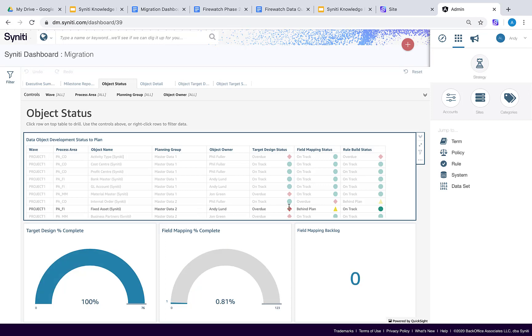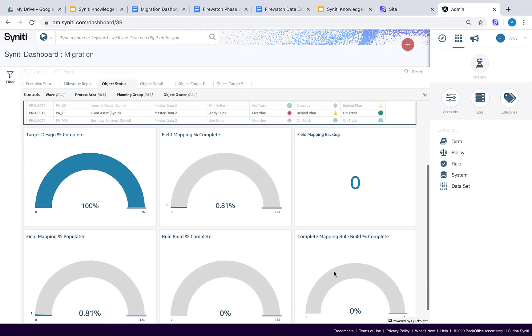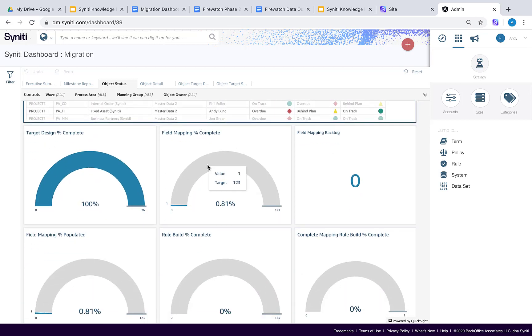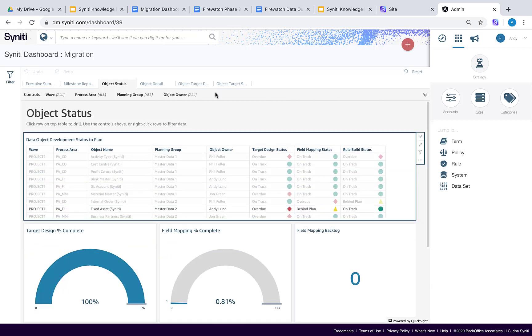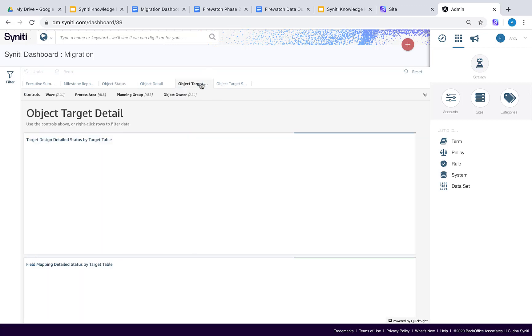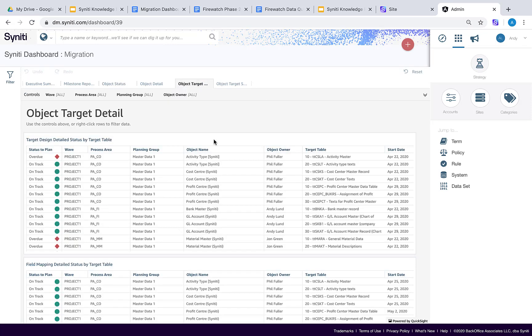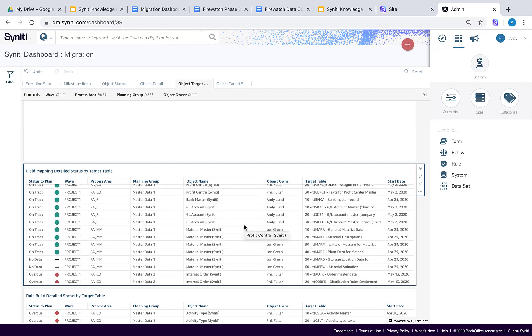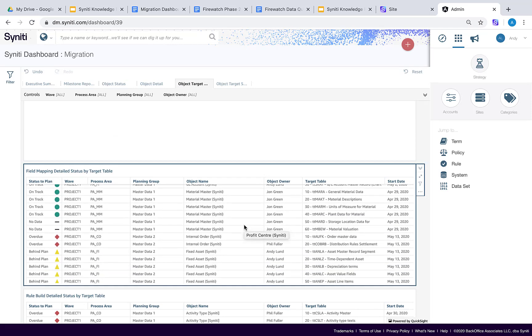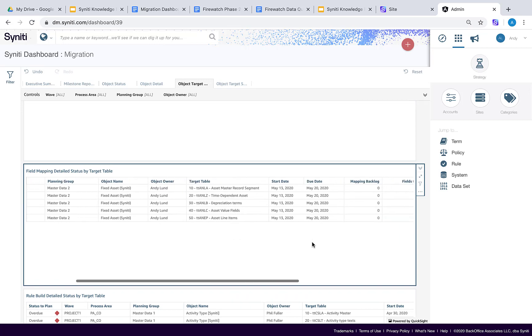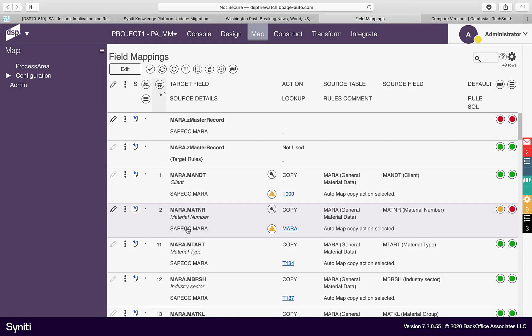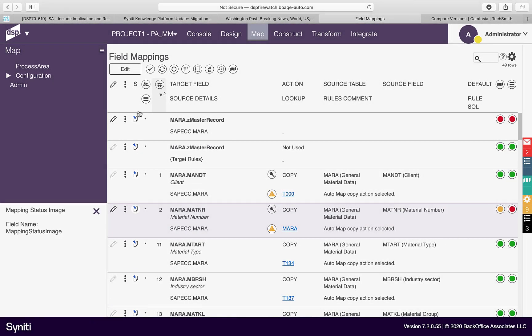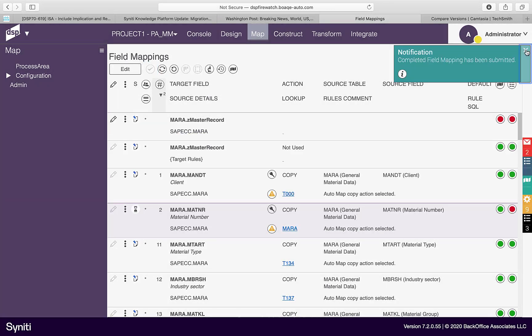In the following example, the field mapping status to plan for fixed assets is showing as being behind plan. By drilling down into the table detail, we can see the field mapping start and due dates. These dates are used to calculate forecast percent complete based upon how many field mapping days have passed. Field mapping metrics are driven based upon mapping status in ADM. Setting a mapping action and entering the associated information will set the status to in progress, while submitting for approval will set the field as being complete.